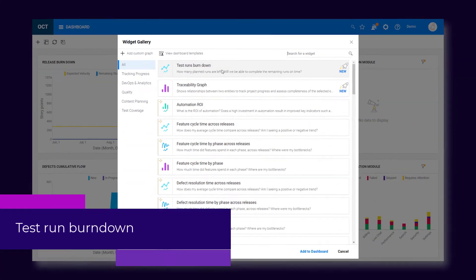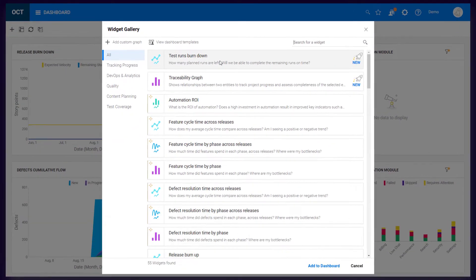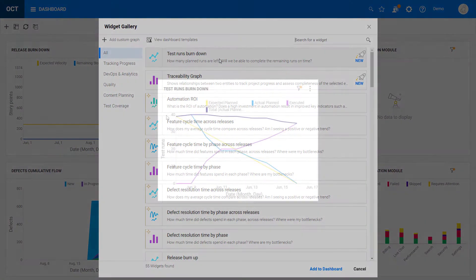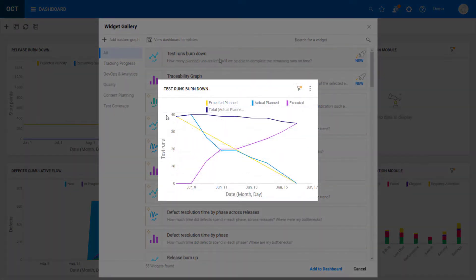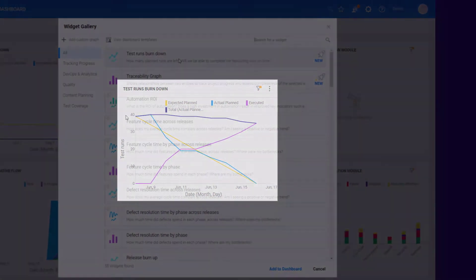Beginning with the dashboard, a new burndown widget shows the execution of your planned runs over time. This can help you see if testing will finish on time or if you need to add resources.